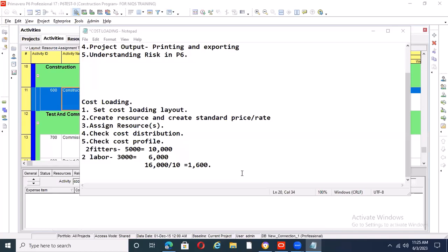You can start breaking it down: excavation, right? You now do earthwork support, one. Then just like that, you have it one after the other. And sometimes, even that earthwork support, you will break down into meters by meters, numbers by numbers, just like that. Because if I have an excavation on the BOQ that is about maybe 2,000 cubic, right? I have excavation that's about 2,000 cubic.